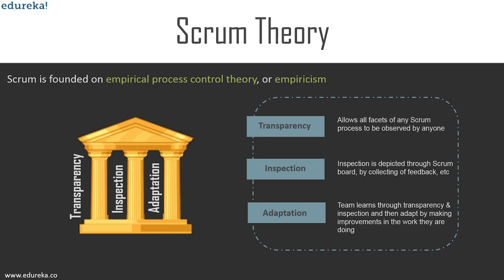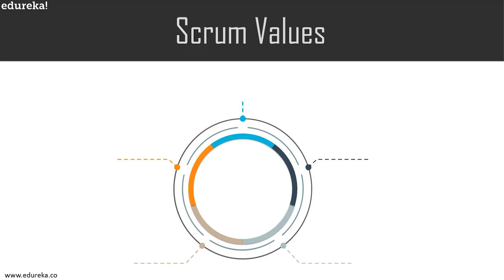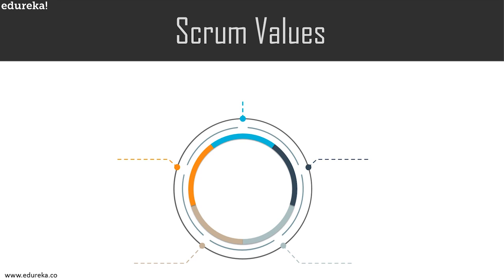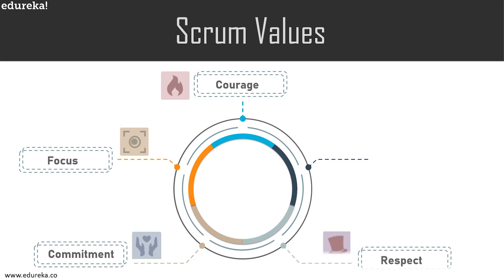With empirical process control, you don't fix the scope of the product or the process of how to build it. Instead, you create a small shippable piece of product in short cycles, inspect what and how you created it, and adapt both the product and the way you built it, with built-in mechanisms for transparency to enable clear inspection. In addition, Scrum adds five values that each team member uses to guide decision-making: courage, focus, commitment, respect, and openness.